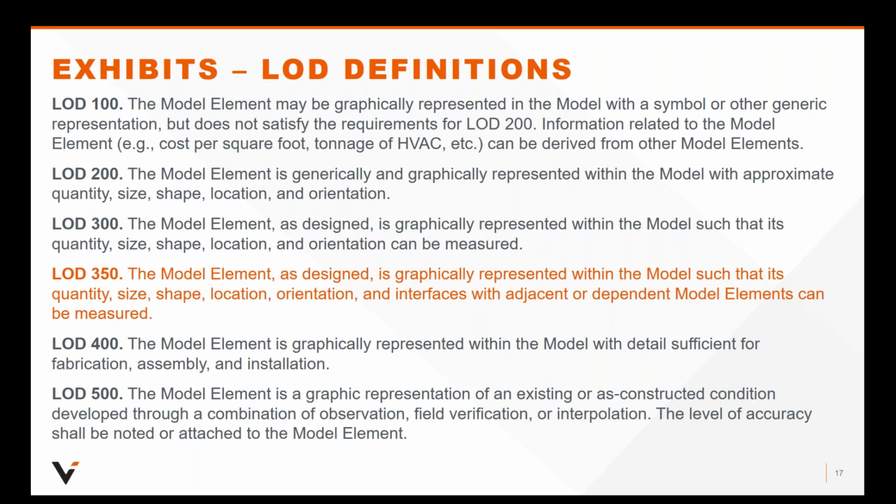And that's because it's one thing to rely on the shared digital information, the graphic information, but if there's other information that goes along with it, that has to be looked at separately. That has to be authorized by the model author for a specific use. And while safeguards are in place for the model information, the exhibit also states that for the creation, the storage, the management, the archiving, the sharing of digital data other than the models, the participants will use their own protocols, except in what they may have negotiated or noted in their BIM executions. Confusing if you're new to using BIM, certainly for those of you who have been using BIM, that's probably to be expected.